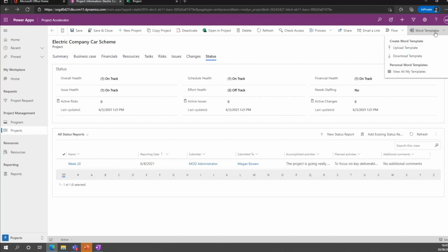You could probably do some trend analysis there to work out, okay, so on go live, if the go live date is X, what's the status of a project going up to it? You'd probably find that for the first 3 months of the project duration, it's all green and all great, but the last 3 months of the project are normally a bit more red, in my experience. So, working across portfolios. But this is the portfolio.